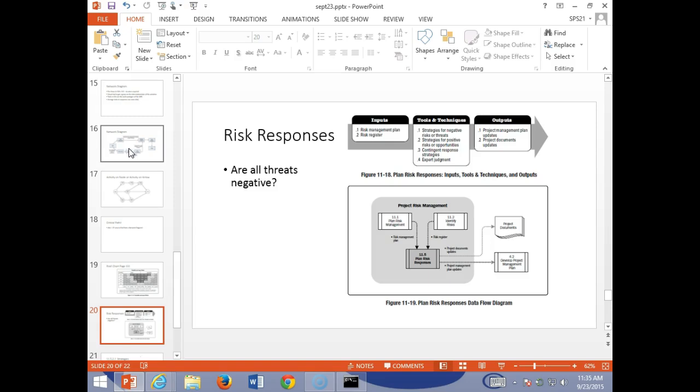So you'll see that at the beginning, what we're trying to tie together is we want to identify all the risks. So we'll do that brainstorming again. What are all of our risks? We're going to plan for them, and those all feed into our responses. So we identify all the risks, we identify the likelihood, what our responses are, and that feeds into a plan for those risks.